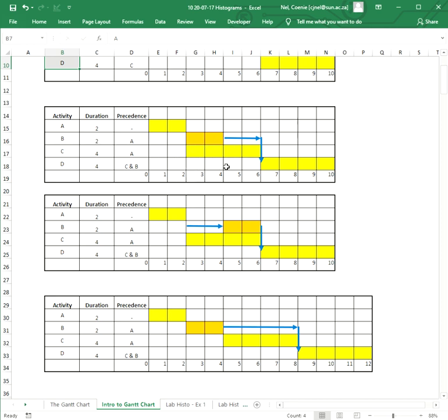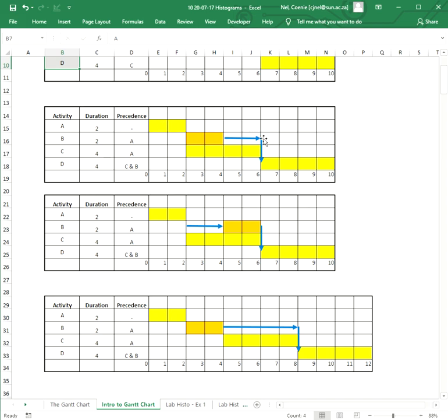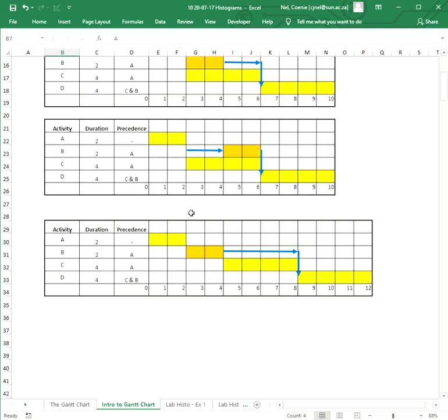Because you've got a float of two and you're not going to influence the total duration of the project. So we use the float to our advantage, but we don't influence the end of the project, the order, or the final duration of the project. So whether we start over there or whether we start over there, it's not going to have an influence.